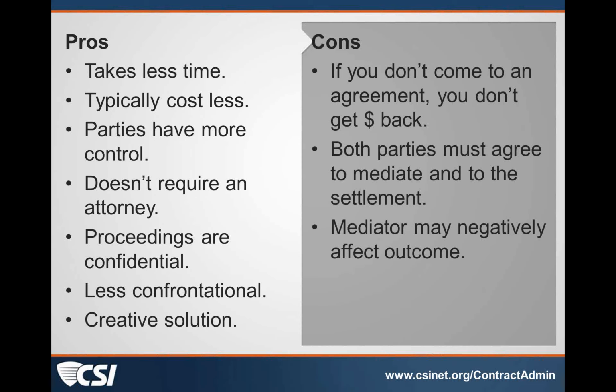And another con is the mediator may negatively affect the outcome. You need to be careful when you're selecting that mediator that he doesn't have a bias to one side or the other. You want somebody knowledgeable about the construction industry, so you don't have to do a lot of education and bringing him up to speed on what the issues might be. There are organizations that certify mediators. You probably want somebody that's been through the process before, knows how to get the parties to come together and negotiate to reach a resolution.